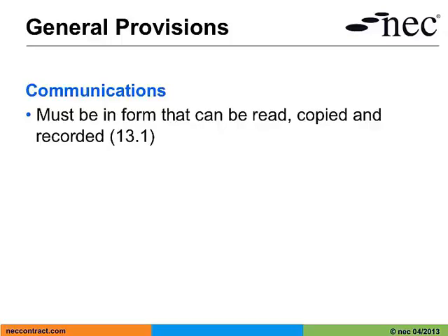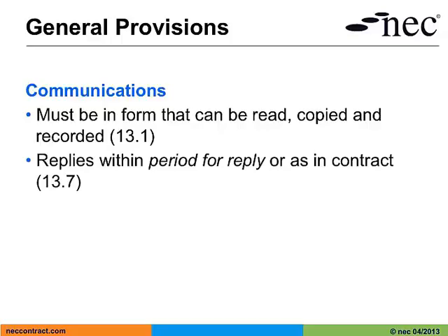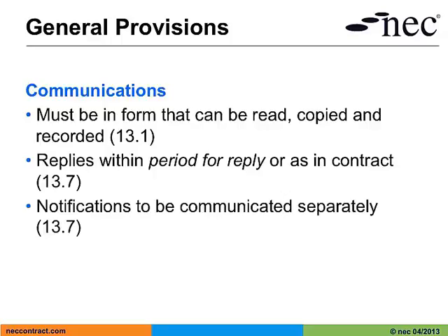Clause 13.7 requires that replies to communications are within the period for reply as stated in the contract. The period for reply, you will notice, is an identified term, which is a period stated in the contract data forms. The purpose of this is to encourage proactive communication between the parties. Clause 13.7 also requires that all notifications are communicated separately. Again, this is about having a good discipline to contract administration.